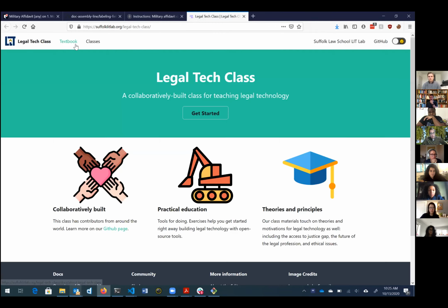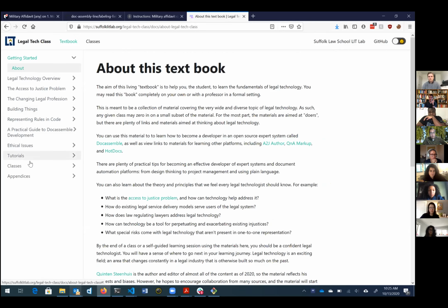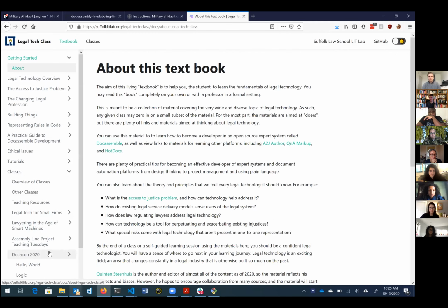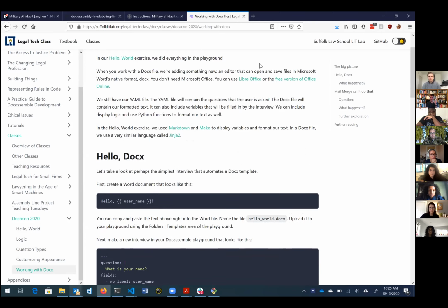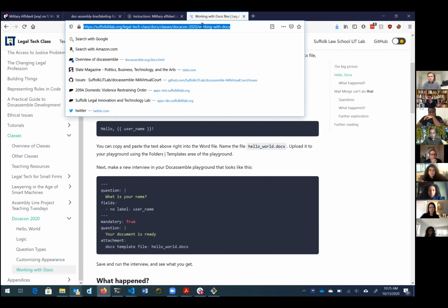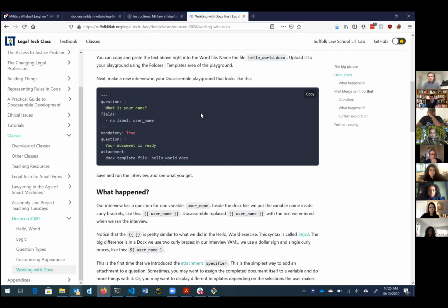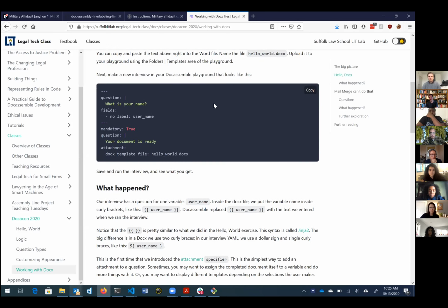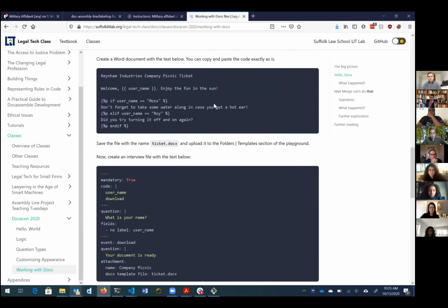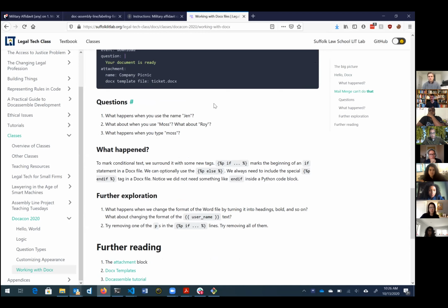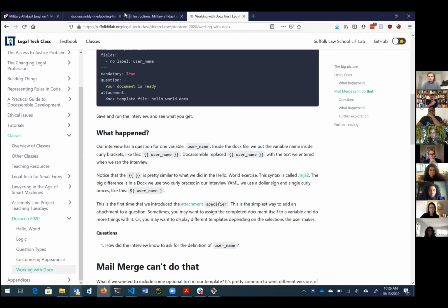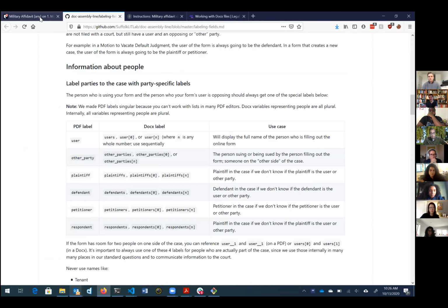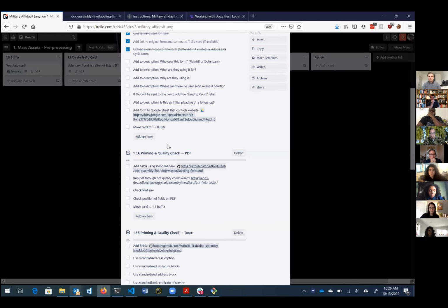And just another thing while Quinn's pointing that out, another rationale for the buffers is that we can then tell that you're done with everything in the preceding checklist, right? As opposed to if you just took it from one checklist and put it in the other, we wouldn't know if you were partway through the next checklist or still waiting, or if someone had even picked it up to start working on it. So it makes a very clear visual indication for those looking at the board that it's done with everything in the preceding checklist and it's waiting to start work on the next one. And so we can then look at where a card is and tell exactly where it is in the process.